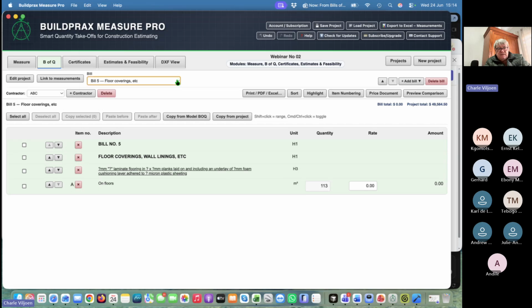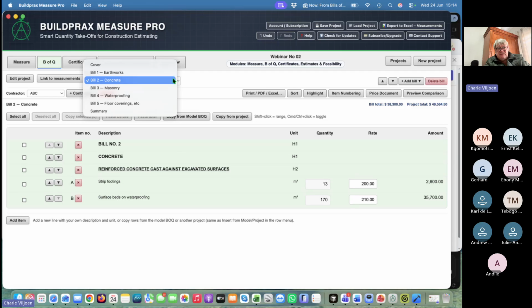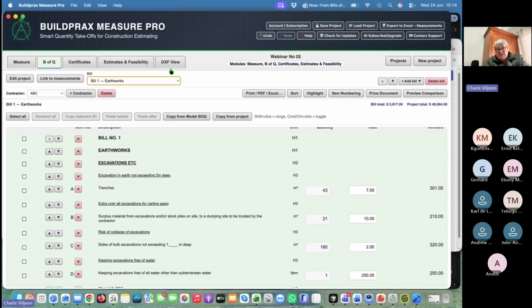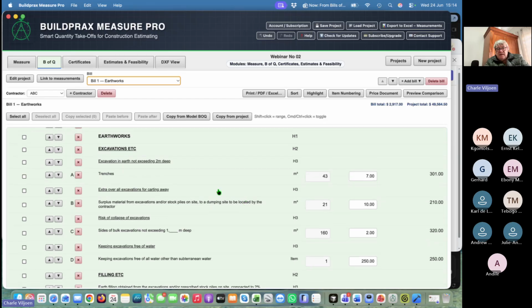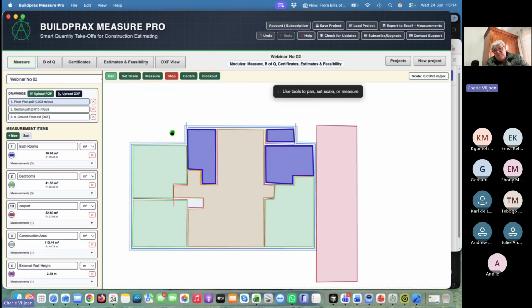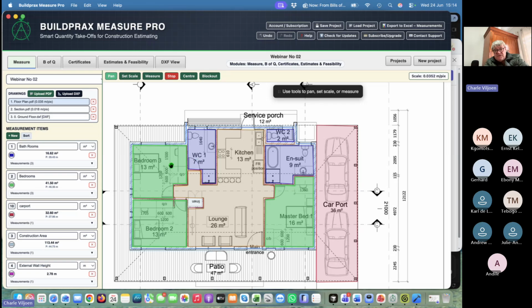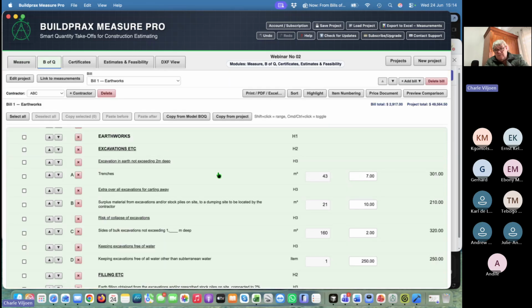on these bills of quantities. I used a sample of it just to get you guys going and to show you what it does. So it's very easy to measure your drawings and your bills of quantities, and they are always linked to the drawing. If these quantities change, so will the quantities in your bill of quantities automatically change.